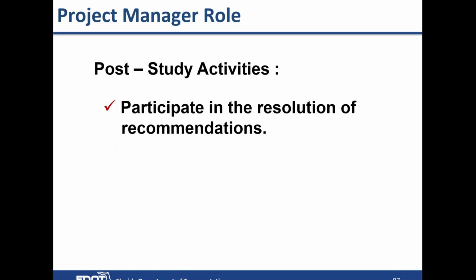Post-study activities are to participate in the resolution of the recommendations, and provide comments back on the draft report and on any recommendation. And typically, I didn't mention this, but on Wednesday of the study, the facilitator and the team will want to have what they call a midweek briefing. It's about noontime on Wednesday. They've got their list of ideas that they want to bring forward and maybe develop, but they like to bounce that off the project team, project manager, to see if there are any fatal flaws. So it's also to be available for that.